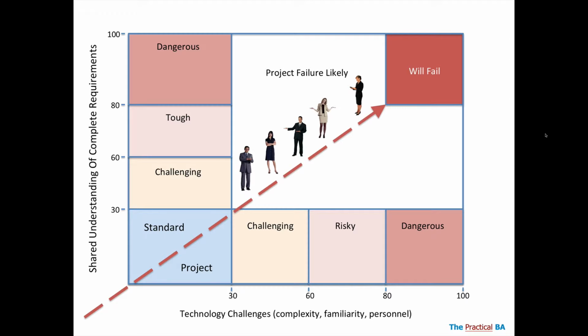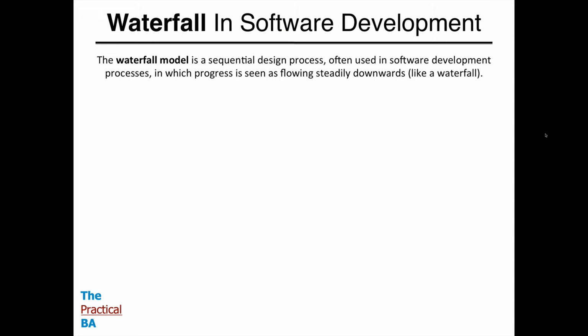So let's see how that applies at a high level to a waterfall phase gate system. So waterfall is a sequential process. So the idea is that you would finish one sequence and meet a set of qualifying criteria before you can go into the next phase. So very often the very first phase is a concept. So you're doing the most basic documentation, presentations to get approval to go to the very next phase, which would be your plan.